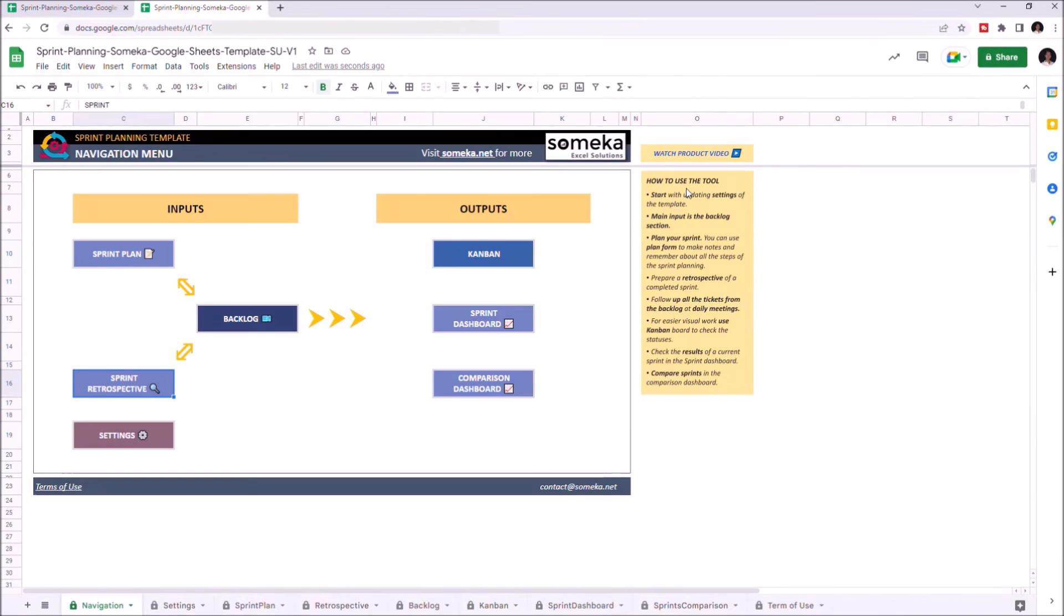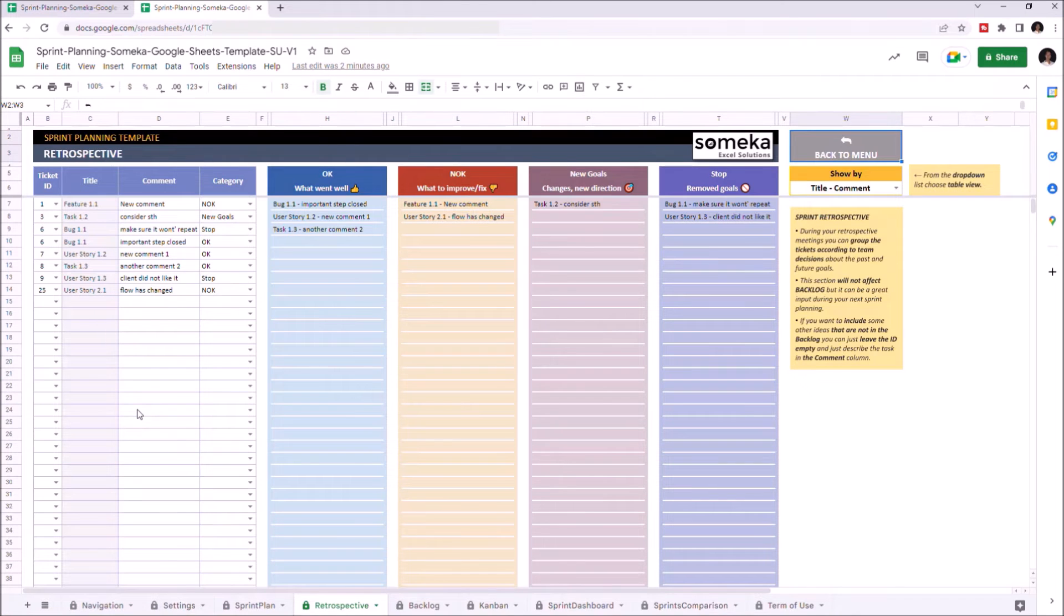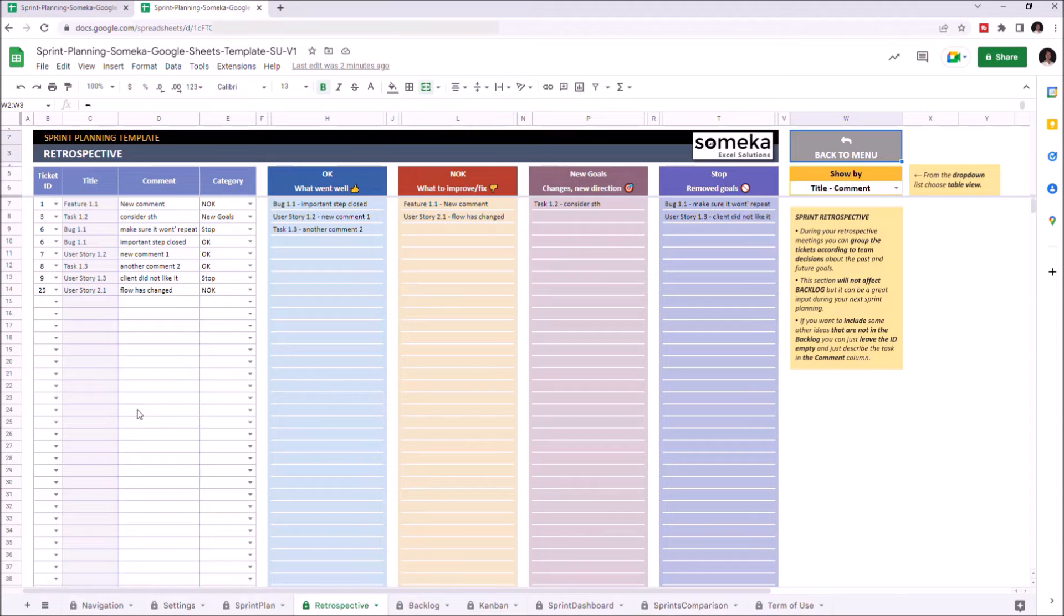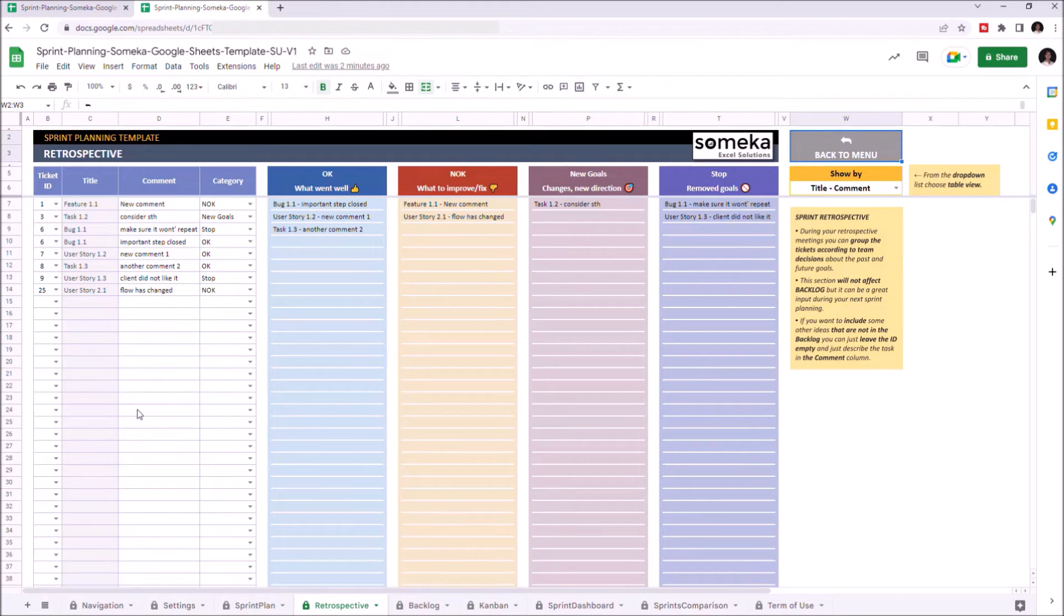Let's continue with the Sprint Retrospective. After each Sprint, you make Retrospective meetings and discuss all the tasks and goals. You can make some comments and decisions of the feature plans of the project. This section is optional, so it will not impact your backlog.